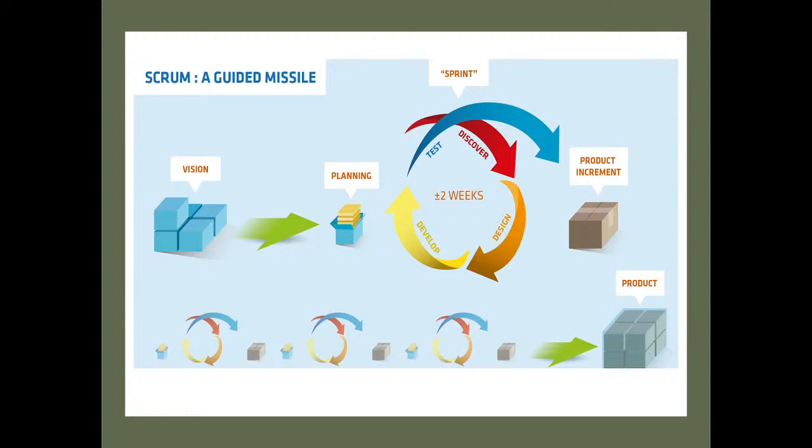So you do the sprint planning, you do the sprint, and at the end you'd be able to do a demo to show what you've done within the sprint. And then after the demo, you can do a retro. A retro means a retrospective, and these are things we'll continue to explain and introduce. So when you do it this way, it means you break down any project into small possibilities that are achievable and clear, and you have a product that you can always show a customer as the product evolves. So you're able to have a clear evolving product.